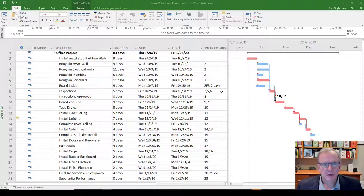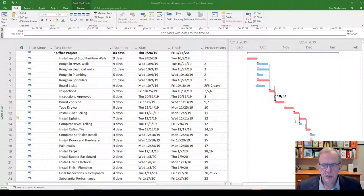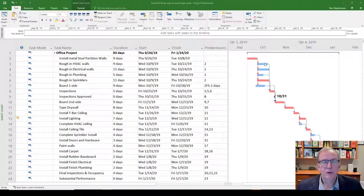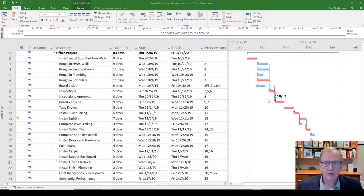Looking at your screen you'll see this layout of an office project — a quick example. Following the Gantt chart, it looks like everything has connections all the way through with a critical path. Reviewing the Gantt chart visually is the first way to check if everything is linked up.